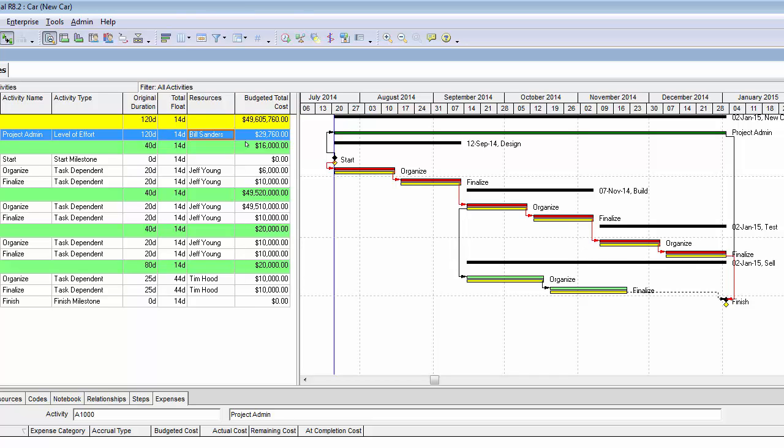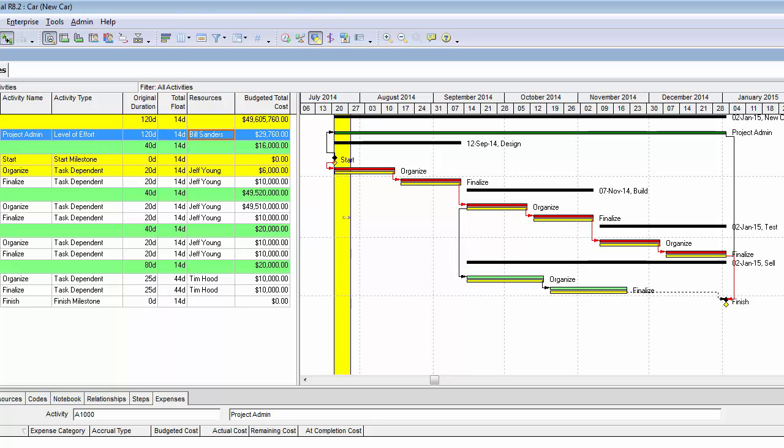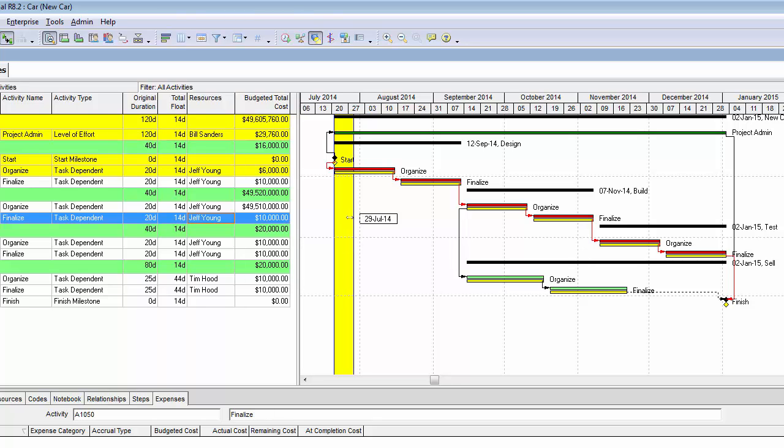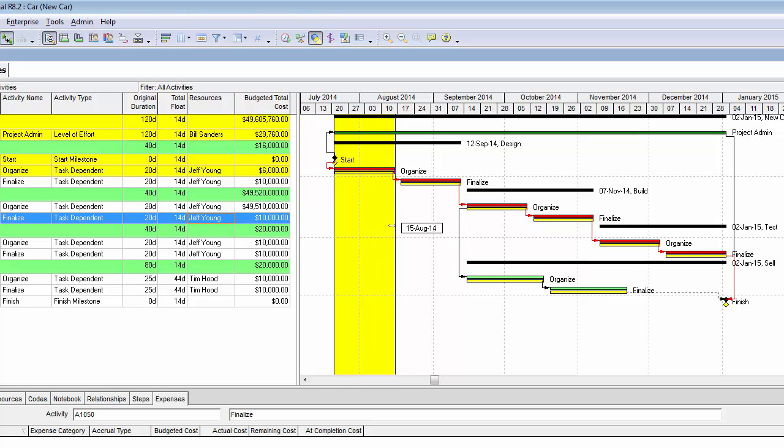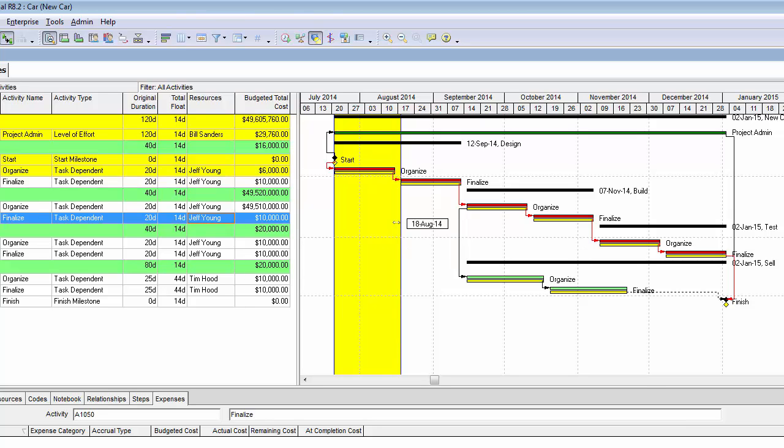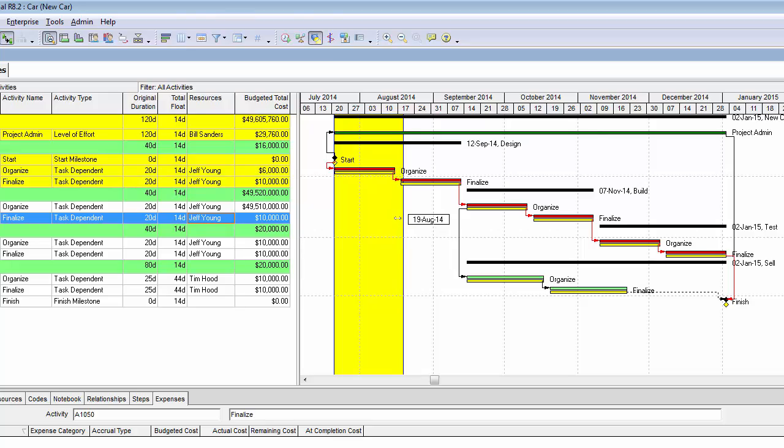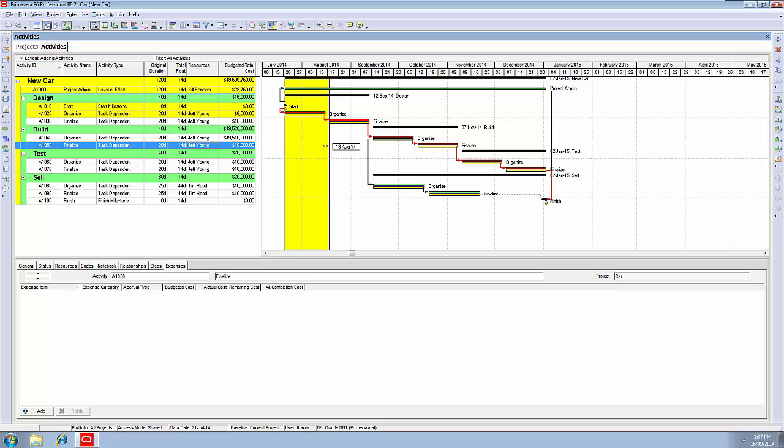In the header, the original has now opened. We're in the activities window. We're ready to go forward in time and status each of the activities that has had work done on it in that period. Having made the copy, the next thing we have to do is highlight through the Spotlight function here. Hit Progress Spotlight. The yellow beam shines down. It goes forward a week by default. We need to drag this right-hand edge to the new data date, which in our case is the 18th of August.